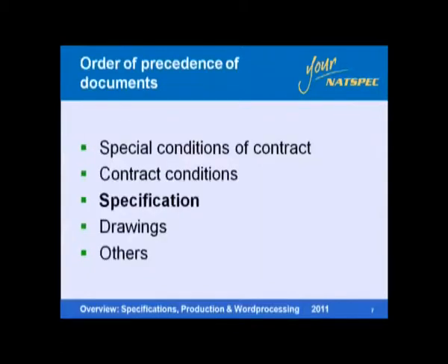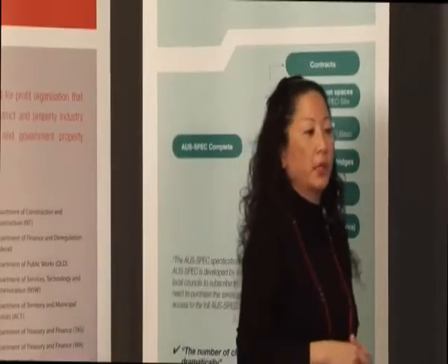The order of precedence of the documents: you can see here that the specification comes prior to the drawings. It's a standard order of precedence. You can change that order of precedence in your special conditions, but that's just a standard order of precedence of your documents where they'll go first when they're looking, if there's a dispute.